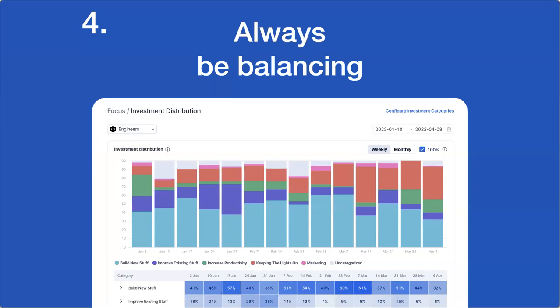And with this kind of categorization, you're able to identify things like, well, maybe we are actually spending 50% of our development time on keeping the lights on. And understanding that will actually help you understand why some projects tend to take a bit longer, because when you're thinking about your roadmap, you're often just thinking about as if the team was just working on the roadmap things, which is building some new things. But the reality is that there's often a lot more, and understanding what that is actually really helpful.